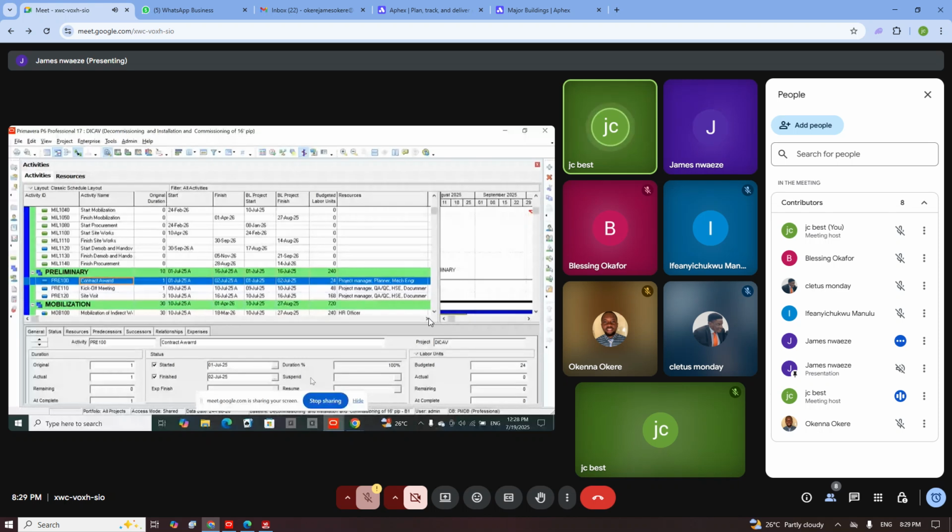Because what I want you to do now is, first of all, delete all your baseline. You will first unassign it. Secondly, you delete it. Thirdly, you go back to your schedule and remove all the progress and make the whole activity non-started. Okay? Are we together?